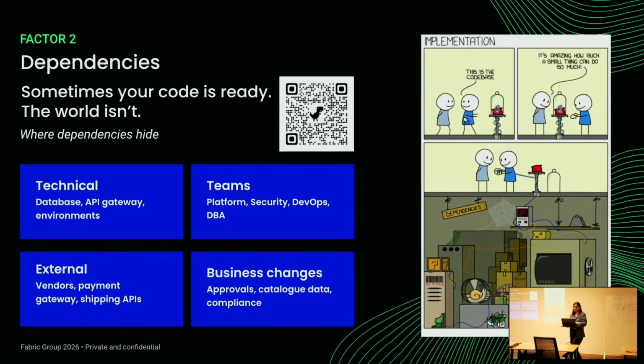Yep. In a lot of teams, there are different restrictions or different kinds of checks you need to do, which we usually know at the very start, but we just don't know how to factor them into the release plan. So just like you create story cards, you also create dependencies in your backlog and estimate them if there's work that you need to put in, and have them ordered in your sprint-by-sprint plan or in your release plan when you're building one.